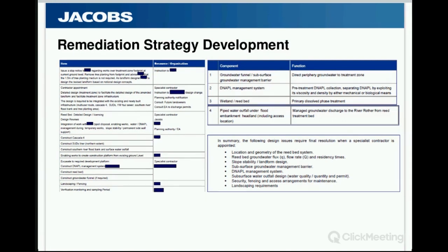This is almost certainly going to require an awful lot of other disciplines other than just the lead discipline: economists and cost managers and civil engineers and ecologists and suchlike. So again, this is also a good point, if you've got financial constraints, as a pause point in the project for you to design and cost for your client what works are going to be required.